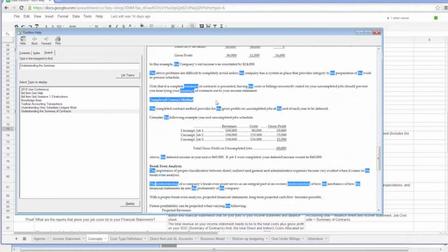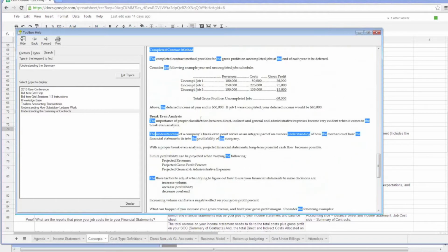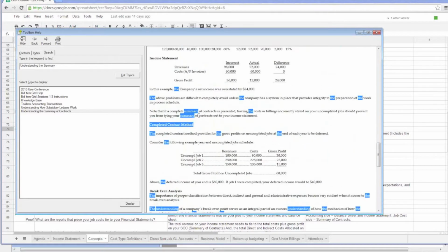There are different methods of accounting that you can interface with. For example, most of the contractors today that are closely held are probably cash basis taxpayers. There are a lot of completed contract basis taxpayers, which means they recognize the costs and revenues on a project when it closes or is close to completed. Cash basis would be receivables in and out. There's something we called the straight accrual method when I practiced in public accounting, and that would mean we're going to back off the over under billings and just do it on the straight accrual method.